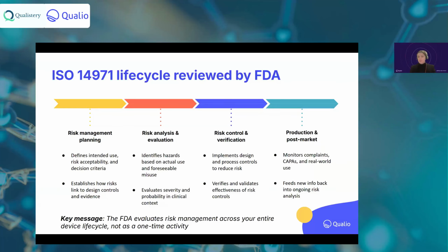Perfect. Okay, great. So, the standard, right? The standard has many phases. First is risk management planning, where you would do your plan document, you establish your risk matrix, etc., all aligned with regulatory strategy. And then the second one is where heavy analysis happens. My team does it in two portions. We do hazard library development, where a team, definitely including the clinical team, systems and risk team, are involved in establishing a hazard library. And my team then does a DFMEA with engineers who would do a component failure analysis on the electronic board, on the software design, and so on.